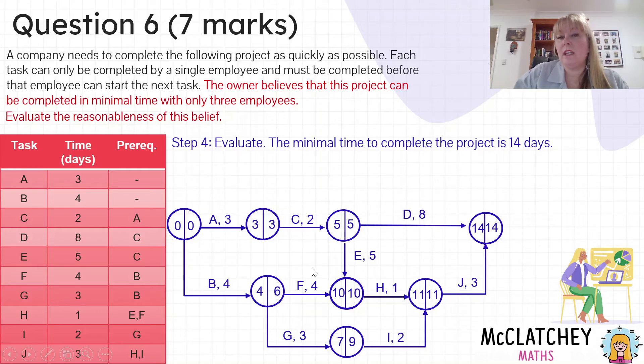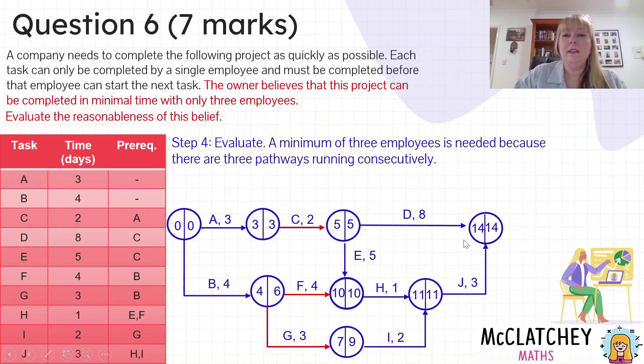So we need to have a think about how that would look. We can see that it's 14 days to do the whole project, and actually writing that down, the minimum time is going to be 14 days was worth a mark. You can see that as where the network terminates at 14 days.